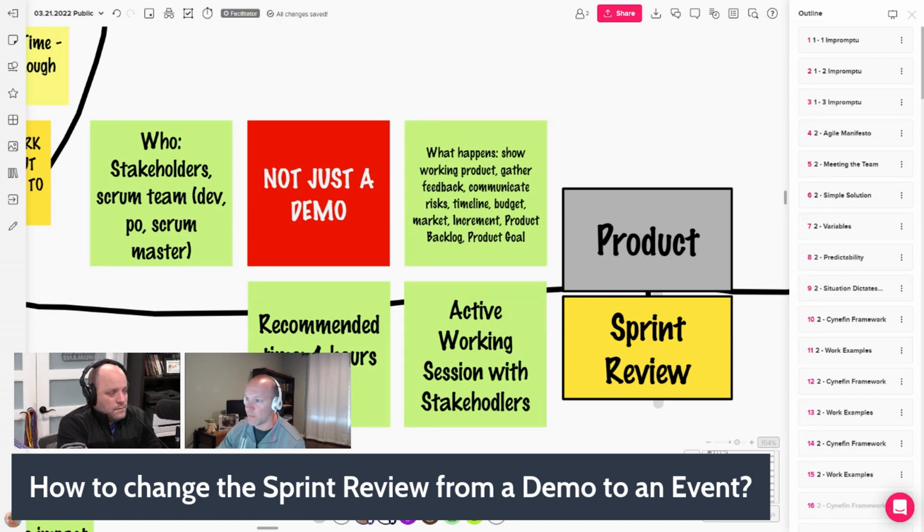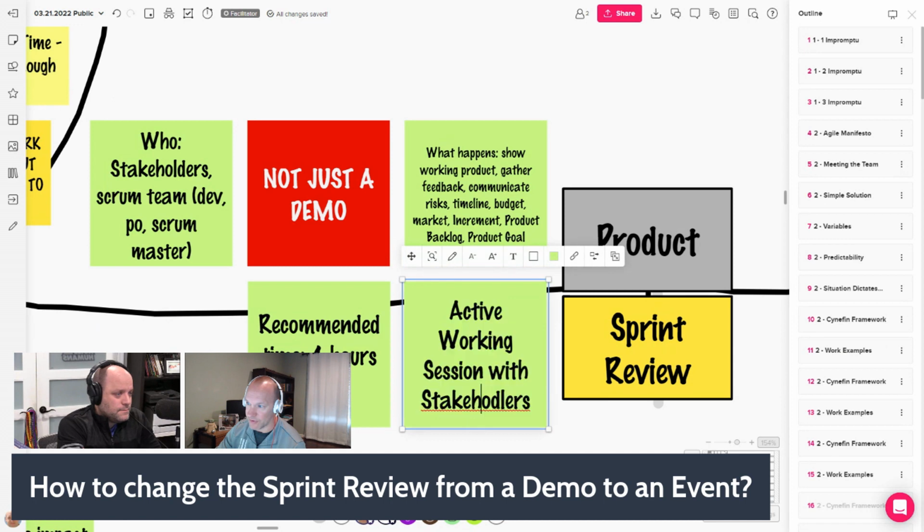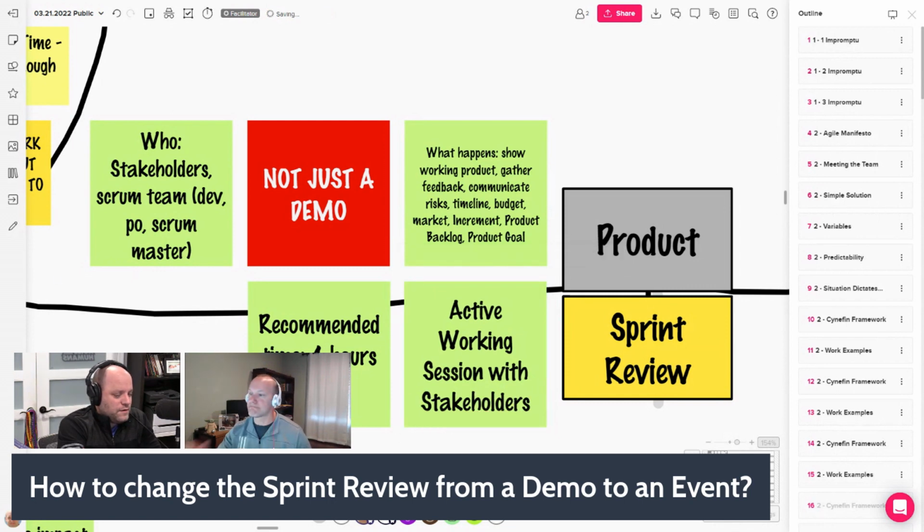I think number one tip, Ryan, throw out your PowerPoints. No PowerPoint. Yeah. I'm going to fix the spelling of stakeholders too while you continue the conversation. Yeah, this is one of those where I can't tell you how many times I've seen a sprint review turn into just a demo where people stop showing up. We just show a few features, everybody claps, and we go on with our day, but it misses the whole point. The point of a sprint review is to emerge with an updated product backlog, right?